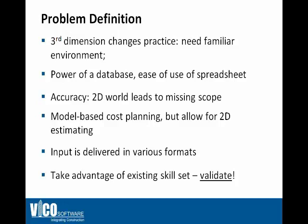From what we've learned working with and talking to customers, the accuracy of 2D estimating is always the result of manual measuring of quantities, or maybe semi-automated, and putting them into the computer to calculate the cost. From what we've seen, that is really a difficult process that can and does lead to non-accurate cost estimates. That is one of the risks in a project.